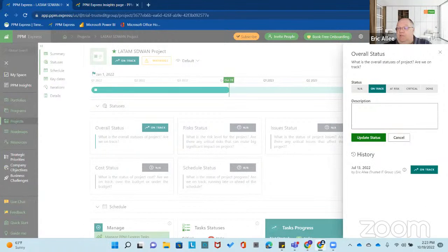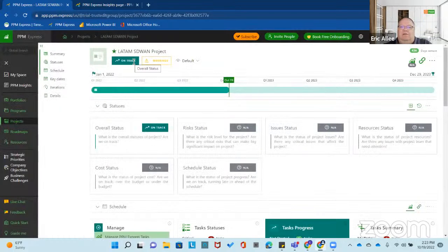You'd have multiple days of these over here. Now, what the system does is give you 7 days, and then the automatic calculation replaces yours. So even if you report normal here, 7 days from now it's going to flip to the actual score. It's going to force you to come back in and re-justify it. So that's an important note to remember. I just wanted to show you how that might work.